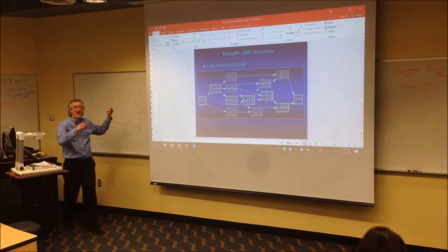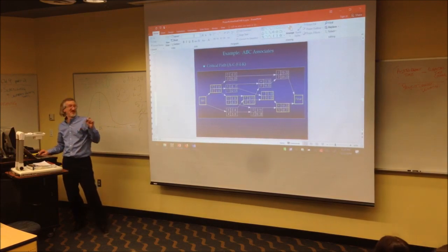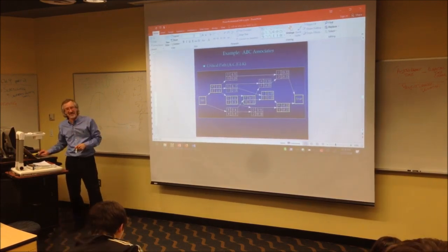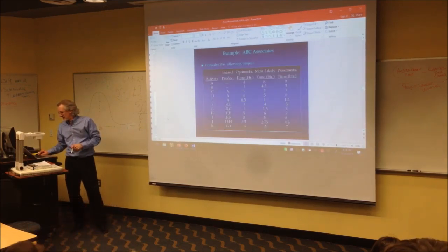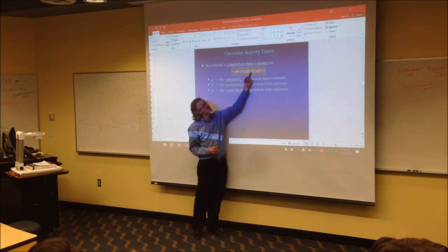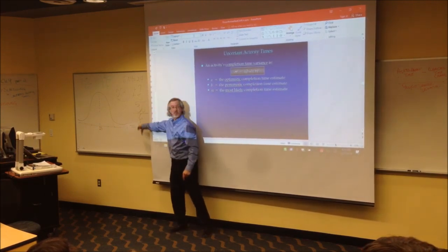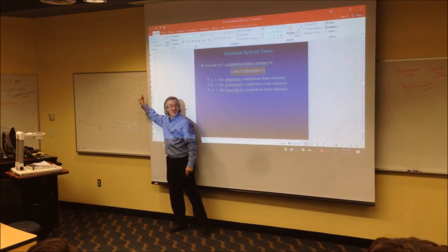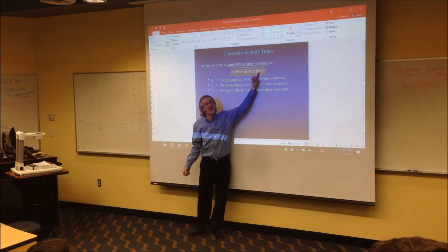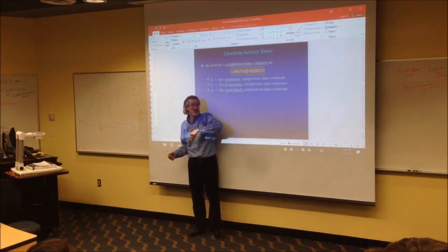Why did we square it? Once we found 1/3, why did we square it? Well, actually, you really are calculating the standard deviation. You're squaring it to turn it back into a variance. And let me show you. You take the longest amount of time minus the smallest amount of time, then divide by 6 and square it. We divide by 6 because we're using 6 numbers to get all of our weighted averages, and then we're squaring it to turn it into a variance.